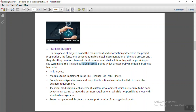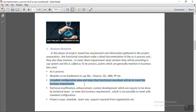The points generally covered in the business blueprint are as follows: first, they highlight the AS-IS process of the customer. Then they mention which SAP modules are going to be implemented to support the client's current business process. The modules to be implemented depend on the client's business type, industry, and other factors. For a manufacturing industry, they generally go with Finance, SD, MM, PP, and some other common modules. The functional consultant also makes a complete configuration plan and the steps they will follow to meet the client's requirements.